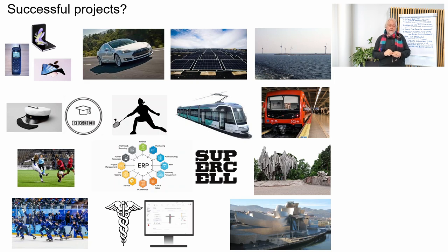The Guggenheim Museum was opened in 1997, a long time ago. And the Basque government decided to invest $100 million to build that museum that was designed by the famous architect Frank Gehry. Also the Basque government paid the Guggenheim Foundation some yearly fees to run and circulate the exhibitions in that museum. So in 3 years, 4 million visitors came to the Guggenheim Museum, and they increased the economic activity in that area by about $500 million and increased the tax income by some $100 million. So in a way, this Guggenheim Museum was paid back in 3 years' time.